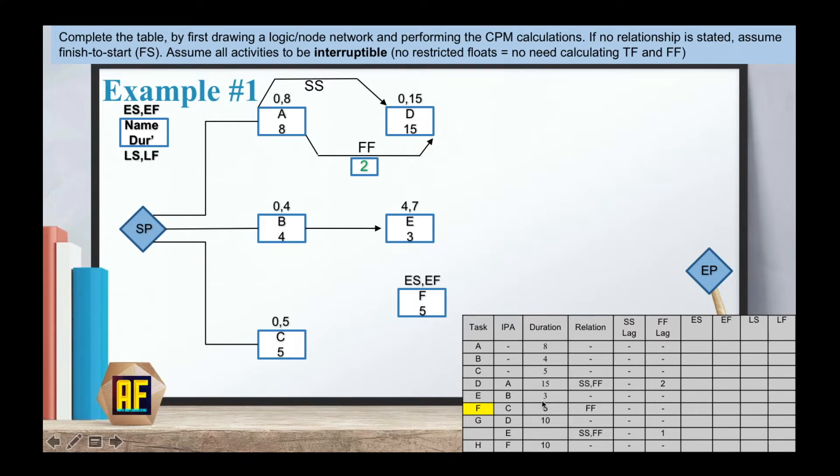Activity F: notice that we have a finish to finish relationship with a duration of 5 days. Activity F cannot finish until activity C is finished, meaning that EF needs to be equal or bigger than 5. We could just pick the number 5 because we want to choose the smallest numbers possible. We want to finish as fast as possible. Let's pick 5 and then our early start will be 5 minus 5 equals 0. This is different from what we had until now, which means that activity C and F will both start at the same time and also end at the same time. By doing that, we can actually save some time on the project.